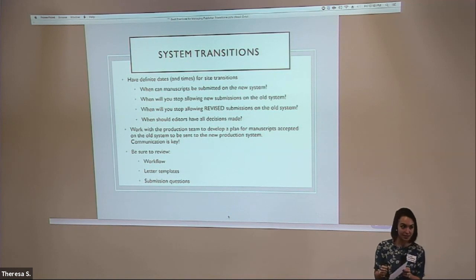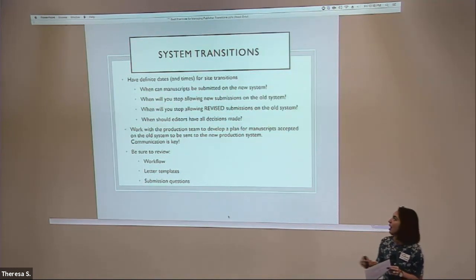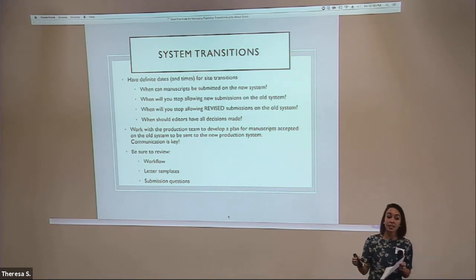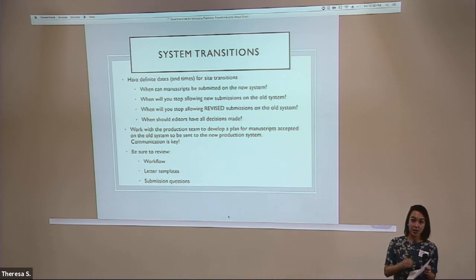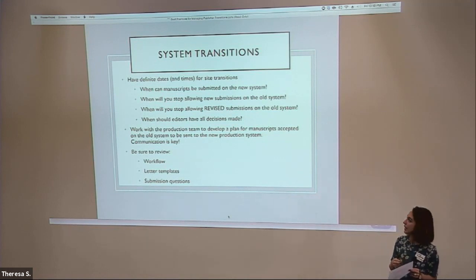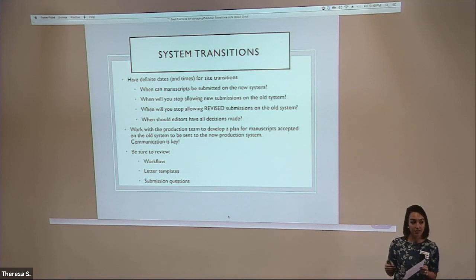Plan for new manuscripts to transition on a single clear date. But you also want to think about revised manuscripts, which are a secondary problem. Do you have an opportunity for revisions to keep coming into the old system? Think about your author experience — what's going to be easiest for them? It's going to be easier for them to keep their manuscript on one system and get a final decision in the old system, so they don't have to submit a revision to the new system.